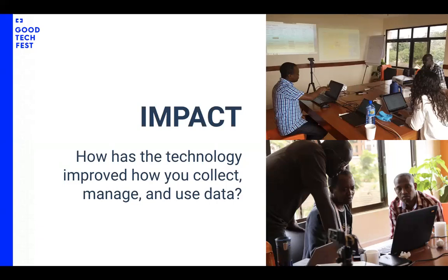And the last one you want to ask yourself is, how much time do your teams and even the clients that you serve need to learn and adopt to the change? You have to adopt a very comfortable pace for everyone. Should you decide to do a phased approach, then you need to be very careful to identify your priorities and your dependencies so that your solution development follows a logical progression.